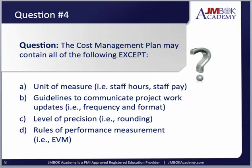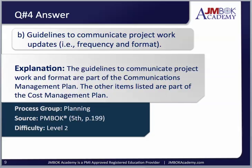Question number four. The cost management plan may contain all of the following except: A. Unit of measure — such as staff hours, staff pay. B. Guidelines to communicate project work, updates, frequency, and format. C. Level of precision — like rounding. Or D. Rules of performance measurement, like earned value management. The answer is B — guidelines to communicate project work, updates, frequency, and format.